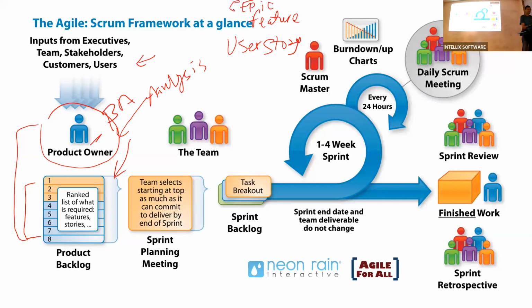So a feature can have multiple stories or multiple requirements. It's a grouping. I'm just explaining the terminology. So you have, for example, managed users. That's a feature. We call it a feature in the Agile terms. In the waterfall document, we were calling it a module. Then you have a bunch of requirements: search user by username, search or add a user, create. All those can be different user stories. And that grouping, this feature, can be managed user.